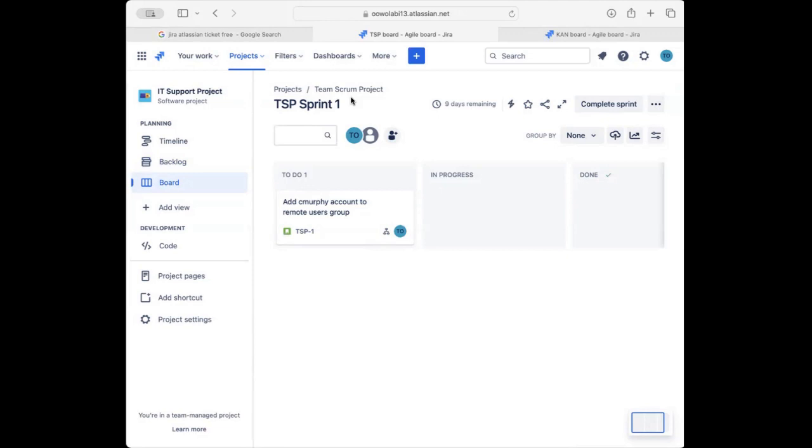They're both great. Now, the main difference, at least from my point of view, is that the Scrum-based projects are governed by time, right? They're governed by time. A sprint is probably about 1 to 2 weeks. So things within a sprint must be completed within that time frame, right? That 1 to 2 weeks. And the time frame is all dependent upon your organization, your SOPs.